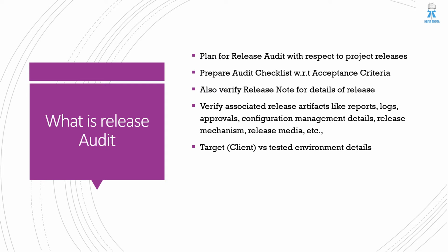Just like other audits, we need to plan for the release audit with respect to the project releases. For example, we will have a project milestone plan or a project release plan with the project manager, SQA, the QA of that particular project, or APQP. You need to get the release dates, and on the release date you need to plan your audit, in sync with the project release plan. That's how we schedule or plan our release auditing.